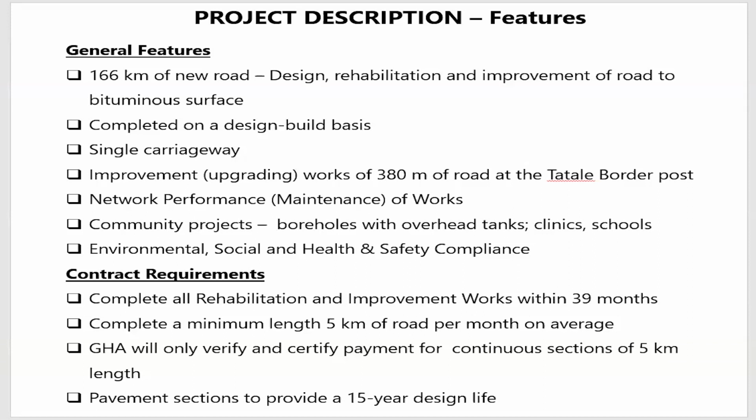He is only paid a lump sum for a minimum of 5 kilometers. Under this project, the road agency doesn't worry too much about payment for earthworks and sub-base, as we traditionally know, up to road signs, up to road line marking, everything.